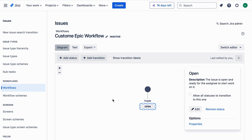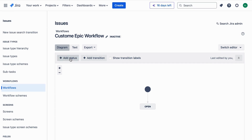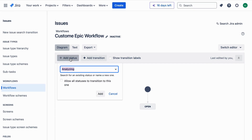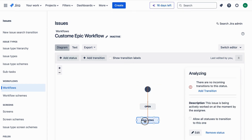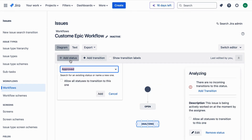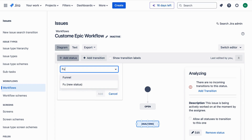Here you see a default workflow with statuses like To Do, In Progress, and Done. We're going to add our custom statuses: Funnel, Reviewing, Analyzing, Implementing, and Done.